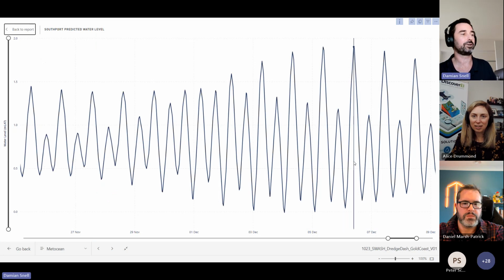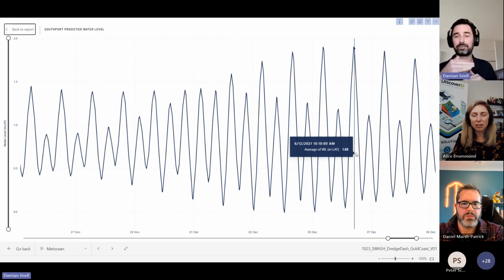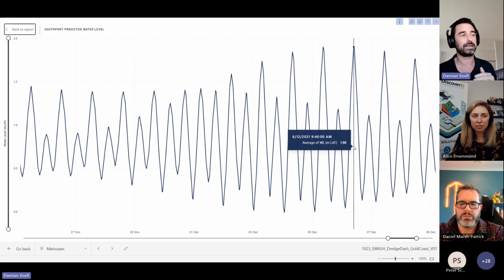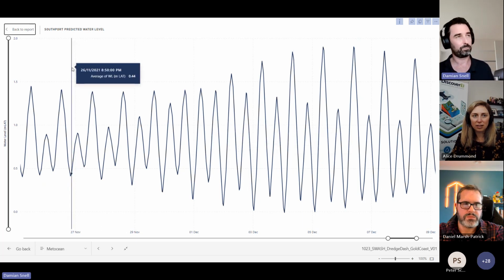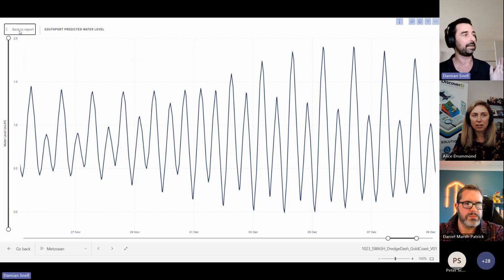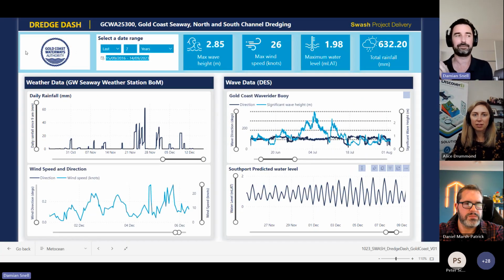It's probably more important for dredge operators. Sometimes they're dredging shallow waterways of 2.5 meters depth. So it's important to get in on those high tides when there's an extra 2 meters of water on top of that, so you can get your dredge vessel in a certain location on the high tide. So yeah, and that's a 1 week look ahead. Being that predictive look ahead for the week ahead.